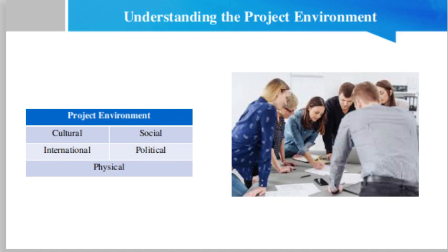It is often the simplest things that can cause trouble, since unsurprisingly in different countries people do things differently. One of the most simple examples is date formats. What day and month is 2/8/2021? Of course, it depends where you come from. In North America, it is February 8, while in Europe, it is 2nd August. Clearly, when schedules and deadlines are being defined, it is important that everyone is clear on the date format being used for the project.